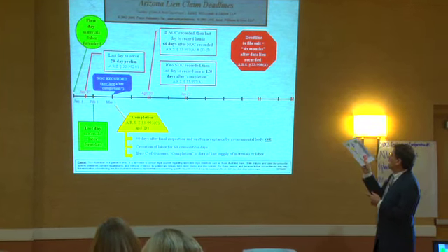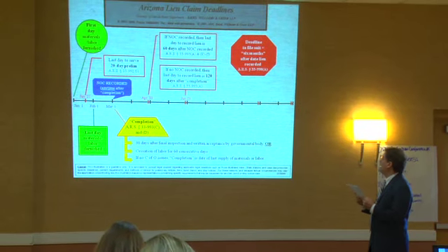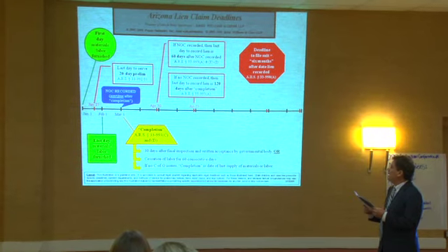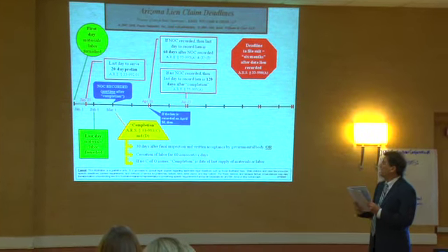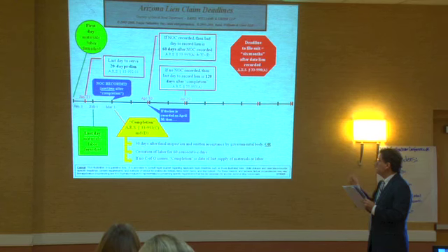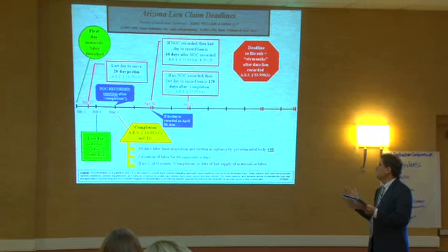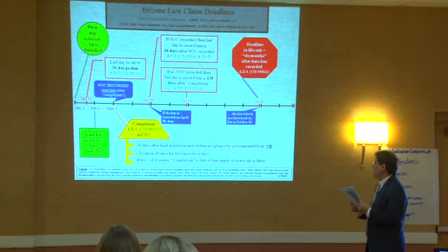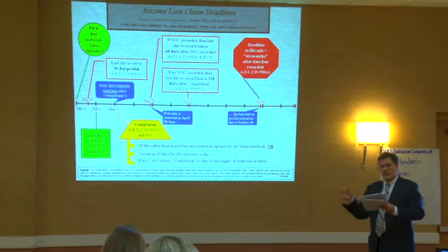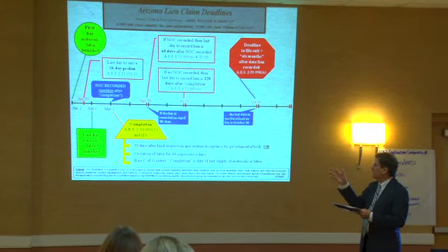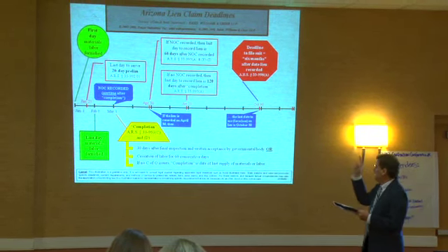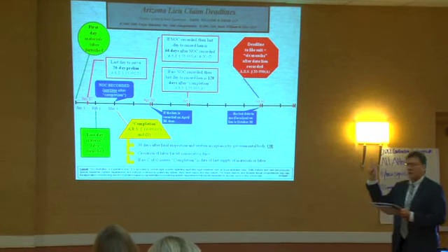All right? Now, the deadline to file suit is 6 months after the date the lien is recorded. So if an NOC was recorded, then you've got 6 months from your April 30th date that you recorded your lien claim, and the last day you can file suit at that point is going to be October 30th. Okay? So with the notice of completion in this hypothetical, March 1, they recorded the notice of completion. They got it served to you within 15 days of the recordation date. April 30th then became the last date you could record your lien claim. If April 30th you recorded your lien claim, then October 30th is the last date you can sue.